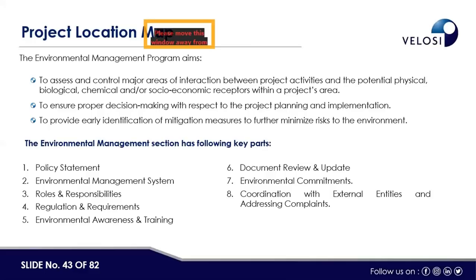Yeah, and the question is, is a DEMP necessary to include along with the CMP and OEMP? As I mentioned, the DMP is required during decommissioning or demolition. If the project requires a demolition or decommissioning, then we have to develop the DMP. And again, I will say that it is the regulatory authority who decides whether we can integrate or not. But it's a very rare case. Normally, separate plans are required for each stage of the project.